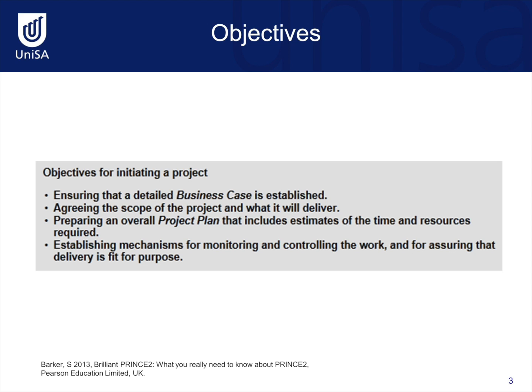Another thing that needs to be prepared in this process is a plan for the project. Every project needs a plan, regardless of whether it's going to take 3 weeks, 3 months, or 3 years. We need to have some sort of plan that estimates the amount of time the project is going to take and what activities are involved within that plan. This could include a work breakdown structure or work schedule, as well as the resources that are required to complete the work.